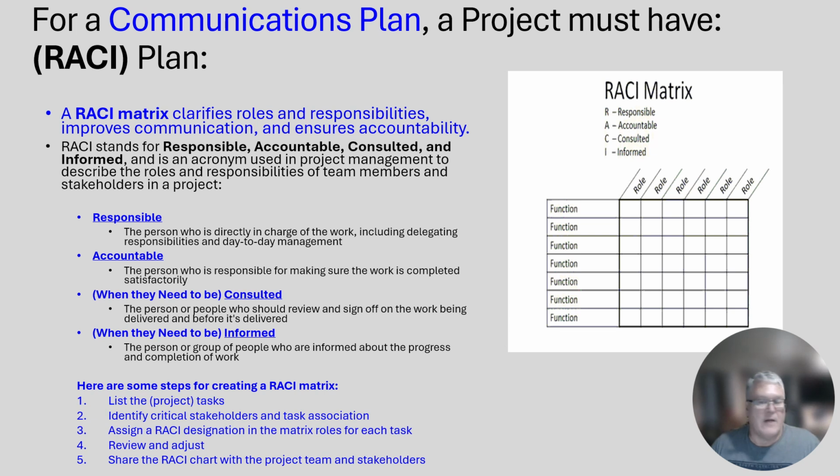So the RACI chart, it's thrown on here. Why? Because you're doing scheduling. Okay, you're going to have to talk to people and say, okay, can we get this done in a certain time? What are the resources you think you'll need to have? And so that's why a RACI chart, especially if it's a large project, you need to know who's responsible, who's accountable, who's been consulted, and then who needs to be informed about it. So I've already talked about this at length, and so I'm just throwing it on here because it is a part of the scheduling process.